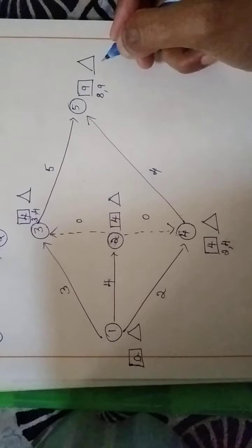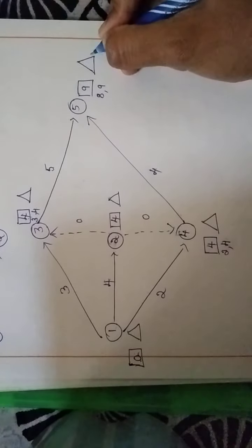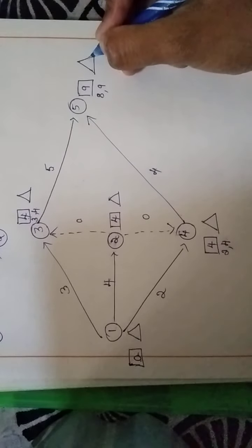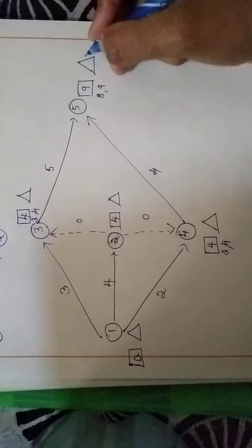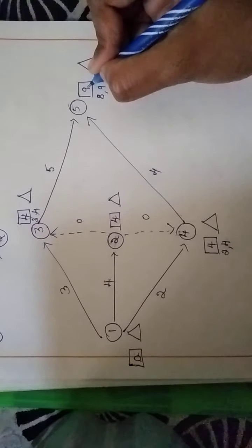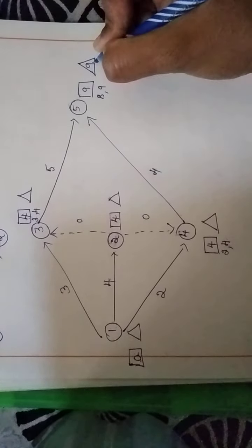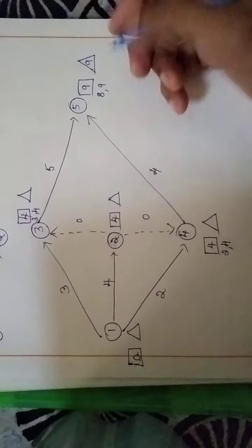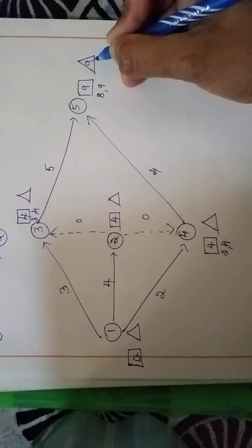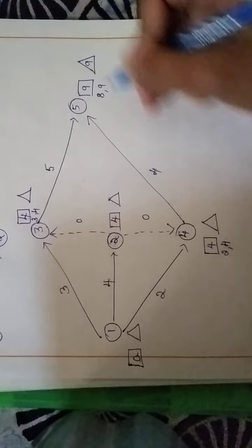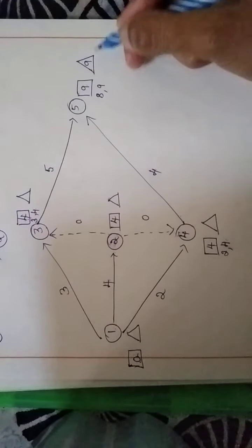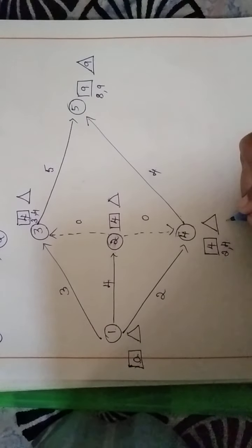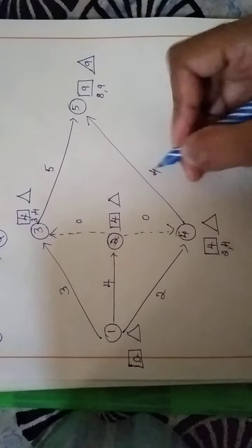Now let us work out the latest finish. The latest finish time is written within the triangles here. So we have to start from the last node here, and I am initializing it at 9. It is backward moving. So here what we do is 9, right? So I am going here. 9 minus 4, we have 4, correct? So 9 minus 4 is 5, sorry.